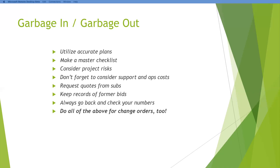Knowify is a great place to do that — they have different ways you can templatize things. And the other thing I want to point out, bolded here, is do all of the above for change orders too. Make sure that your clients are going out and getting the proper information they need for change orders. Stuff is happening out in the field. The super on the job comes to the project manager and says we need this change order, it's got to be done now. Encourage them to say 'I will get that to you as soon as I can pull all the numbers together,' then get back into the office, take out their master checklist, and do that for change orders as well.